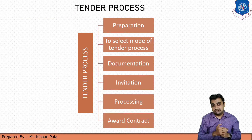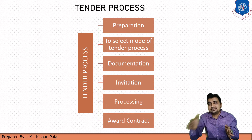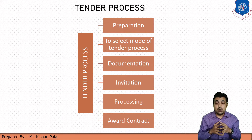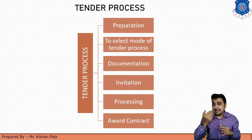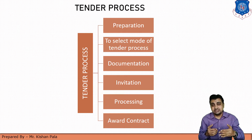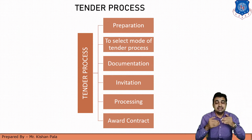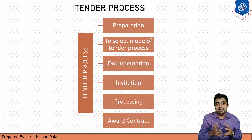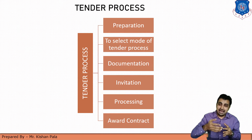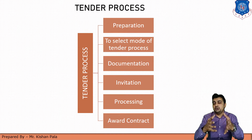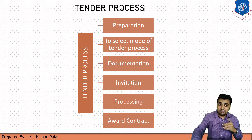Now we will start the tender process. In the tender process, we have to follow certain stages. We start from the preparation of the tender, then we select the particular mode of tender process, then we finalize the document for that work. The next stage is invitation of the work to the market. Next is processing — which involves many sub-stages like submitting of the tender, opening of the tender, rejecting of the tender, and scrutinizing of the tender. After passing all the stages, our last stage is the contract, meaning we have finalized the contractor to do that work. Let us discuss these one by one in detail.